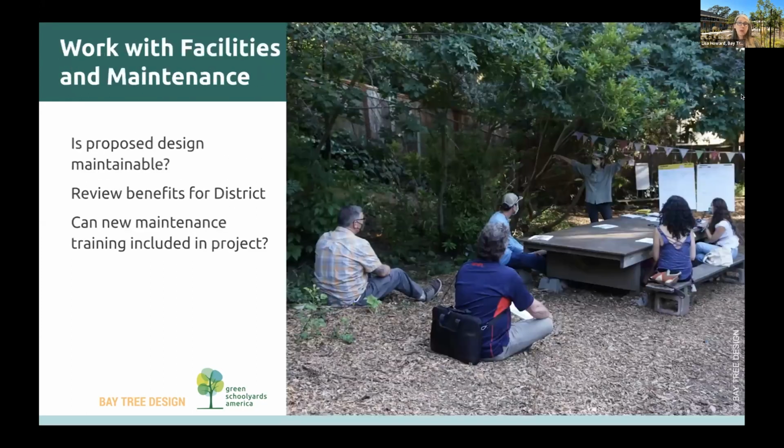So with that, we also want to meet with facilities, the district. How do we talk with facilities and maintenance crews at the district early on? A forest is a real big shift in maintenance typology for all school districts in California. I don't know about places across the country, but definitely here. We want to talk about how it's easier for them. What are the expectations for maintenance, and what kind of training might be incorporated into the project? In California, we have money for capital improvements, but we lack resources for really training district crews and upping the amount of maintenance that a district can take on.